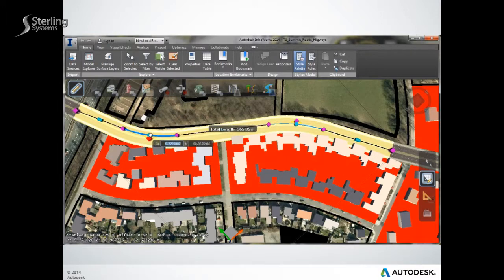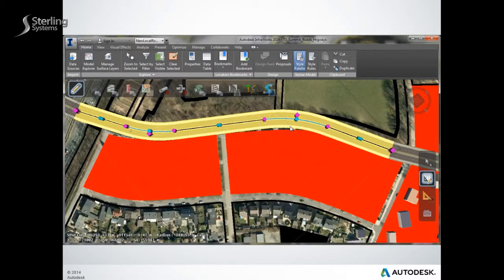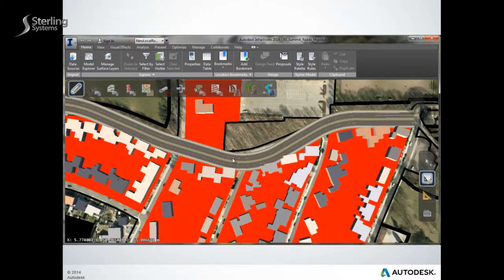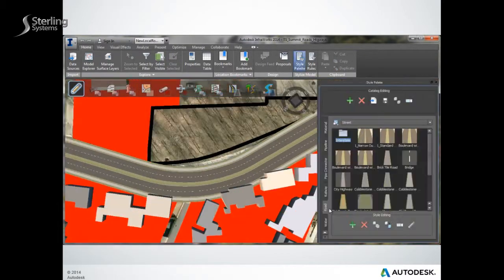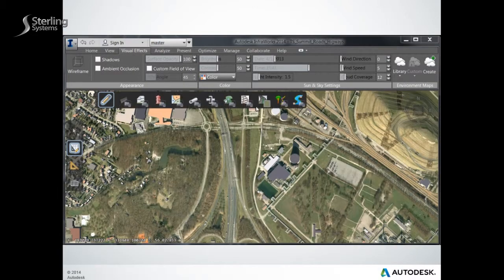One of the goals of the 30% design review is to ensure that the design team is on track, as well as understanding what pieces of the project would require things like right-of-way purchase or special permits, so the processes can begin alongside the design and not cause a bottleneck later. Right-of-way acquisition needs and impacted land types are considered as part of the decision-making process at this stage. In this scenario, the analysis tools in Infraworks were used to identify several parcels that would be expensive to purchase. You can work through different alignments and land configurations to find an alternative that avoids impacting these parcels.